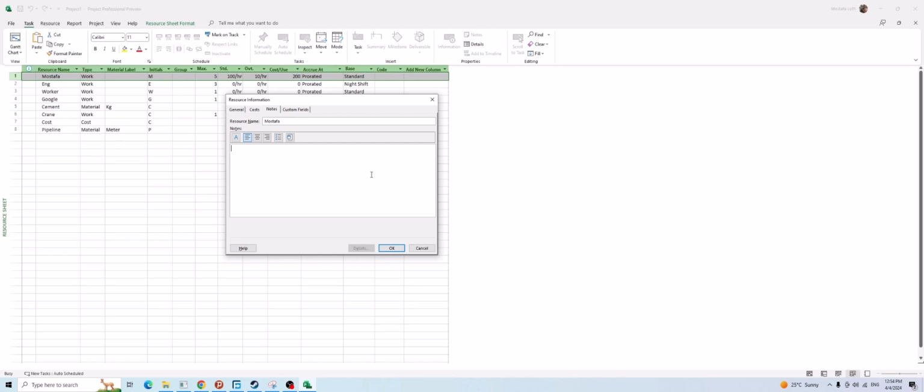If you put the whole document, PDF file, image inside of the Microsoft Project file, it will increase the size of the project file, MPP file, and it can create a problem when you want to load the file or transfer the file. So I do not recommend that, but you can use the notes tab for more extra information regarding the resource you have.